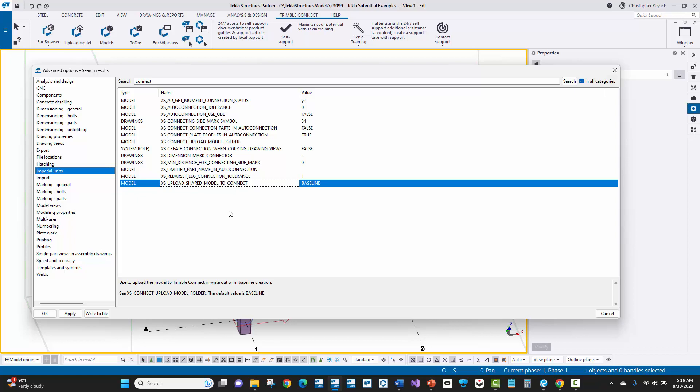Now, another thing we can do here is there's this XS upload shared model to connect and this has the option of when do you want it to upload. And really the two values here are upon every write out with model sharing or using it at each baseline. I usually, if I do use this functionality, I tend to do this more like at baseline because every single write out means that every single detailer is constantly doing that like throughout the day and there's really no need to have that live version of the model up on Trimble Connect. Really what I usually do as the detailer, I pick my lead detailer project manager. I set them because they're invited to the Trimble Connect project. I set them to make the baselines and then periodically once or twice a week, they will publish that baseline for model sharing purposes and for backup reasons and for joining the model. But then that's a good solid point for me as the lead detailer project manager to then publish that model to Trimble Connect for the fabricator and erector to use.